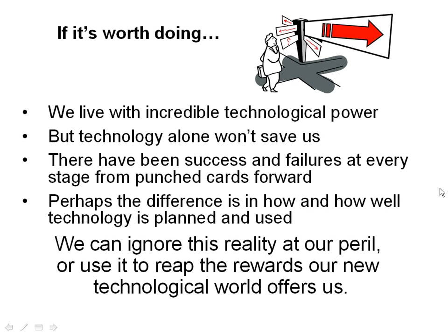But if you can't use an RFI and you have to go to a formal procurement, I think what you end up doing is bringing the concepts that you would have used in the RFI, to the extent you can, into the formal procurement. Ask all those same questions. Provide more detail. I once worked with a state government that put out a major procurement, and they did 8 pages of requirements description. I'm sure people were laughing all over the industry because they simply hadn't described it well enough. So describe it very well. Let the people know that you want their best thoughts. Now, you may not get them in an RFP, but at least give it a try. So you can, to some extent, merge the concept, and I would think that would probably be your best bet.